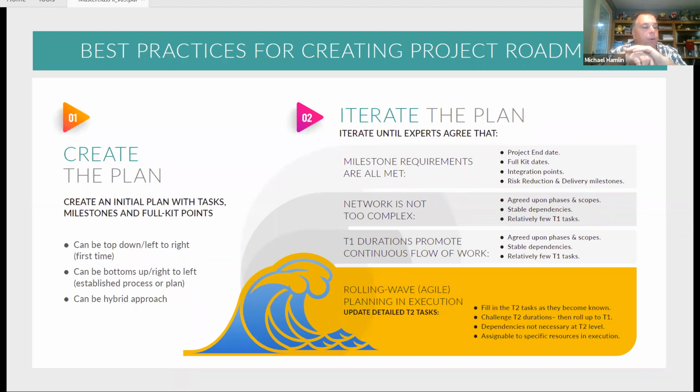The key first is to just start putting down the milestones, the phases, the activities that you need to do in each one of those, and the systems that you need to work on. Then you can start iterating that plan. Look at whether two activities that are in parallel are really isolated from each other, or whether they need to be worked together.